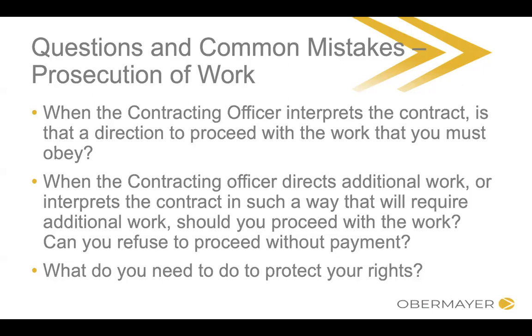You are not allowed to say, I'm not performing until we work this out, until you admit it's a change, until you agree to give me extra time or money. You need to keep doing the work, and on the back end, argue about the days and the dollars, and make sure that in the meantime, you don't sign anything waiving your rights, which we're going to talk about a little bit later.